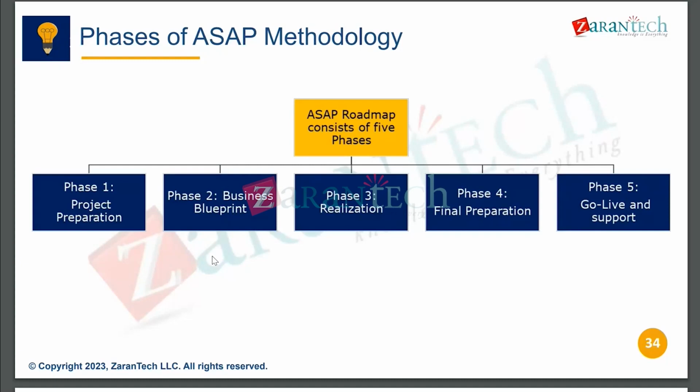So you guys are doing it in a different way. Let us have a best practice, and this is what we are going to implement, which adds value to your business. And these kinds of modifications, everything we will propose, and whatever as-is we study, the current business, we'll prepare the to-be process flows. Means to-be, after implementing SAP, this is how your process looks like. This is how your business has to run. This is what we will prepare here and present to the business.